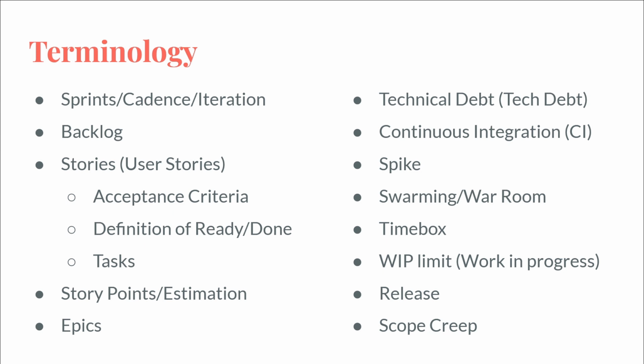And everyone would estimate. And a lot of teams will do a blind estimation, where people will literally hold up a playing card, like an actual deck of cards number, or they'll have poker cards, is what they call them. Or more commonly, people download an app, and they pick the number on the app and they hold that up. And there's literally agile poker card apps for your phones. And so you'd pick the number and then you say, okay, everyone ready? 3, 2, 1, and you show your phone, and everybody looks around.